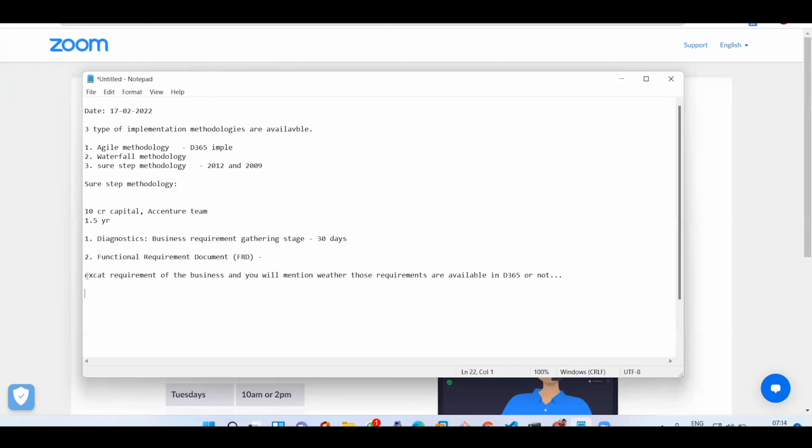And the client will also review the document, and he will say, yes, of course, this is my exact requirement. If any modifications are there, or any requirement has changed, the client will highlight it, and they will ask you to modify the document as well. Because in a company, a document or email is proof that you have agreed. So once the document is perfect, they will tell you that you can proceed to the further stages. So they will give you the sign off.